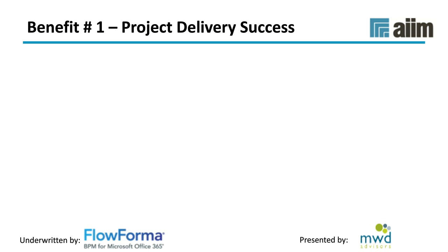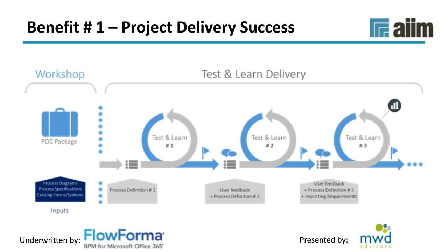So if you look at the top three benefits, the number one benefit would be project delivery success. If you think around customers engaging on long projects, and sometimes we can talk about 2 years, but even if we take a 6-month project, the amount of people involved, the setting of the requirements, and again, from experience in the waterfall approach, you could be spending 3 to 6 months alone working on specification of requirements. So by the time you get moving and working on the project, these things have moved on, these things have changed, and then you spend quite a lot of time working on change requests.